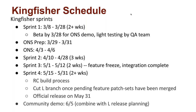The following week will be ONS. We will not have any active sprints but will keep Sprint 1 open so folks can continue working on deliverables if they're not attending ONS. Sprint 2 will occur after ONS on April 10th, spanning three weeks. The following sprint will be two weeks, ending in early May. The final sprint will be focused on bug fixes to allow us to get an RC build in place and a release targeted for May 31st.